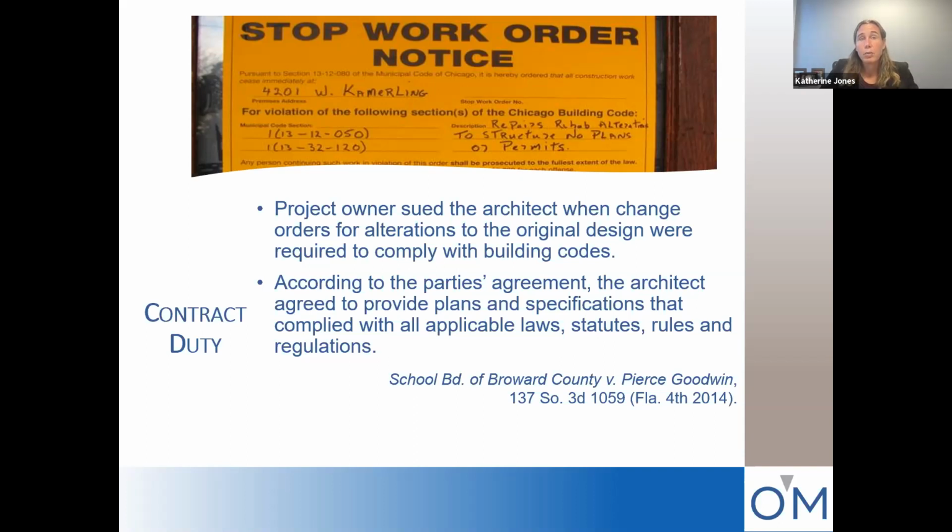So that's an example where something that you see typically in all contracts, that the architect or the engineer is going to provide plans and specs that comply with all applicable laws, statutes, rules, and regulations, ends up creating a higher standard of care than they originally intended when they contracted.